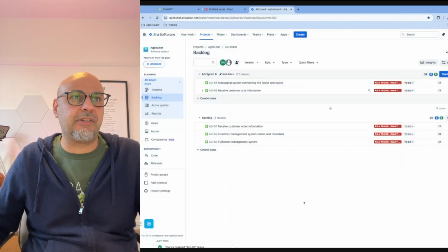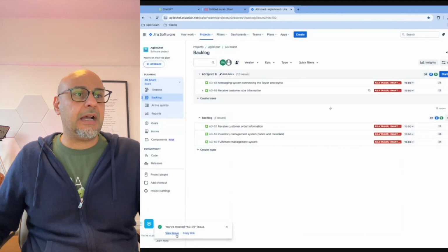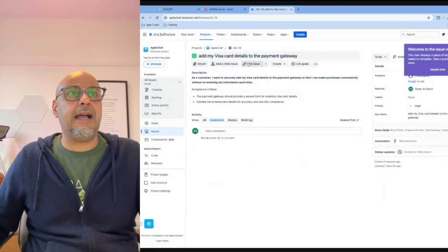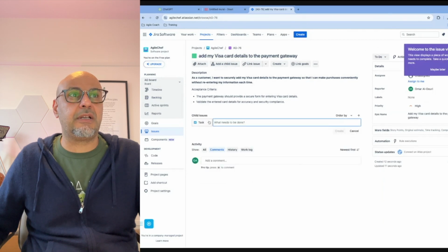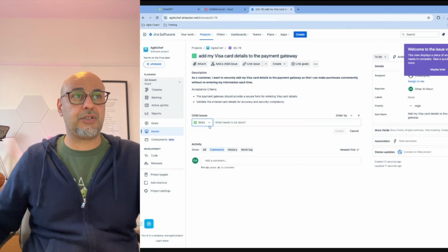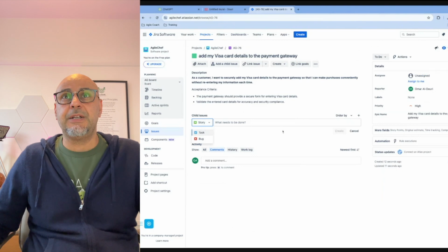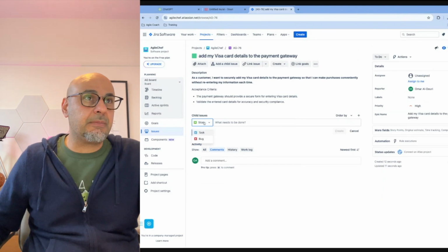Okay, so I'm just going to say create here. And okay, there we go. So view the issue. I'm going to go and view the issue. And here, what I want to do is start adding child issues. The child issues are stories. They could be tasks or bugs, but hopefully no bugs just yet. So I'm going to start adding them.